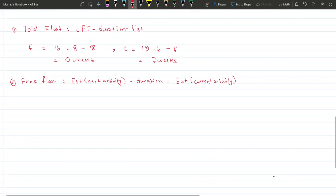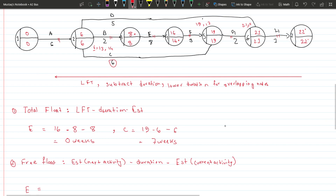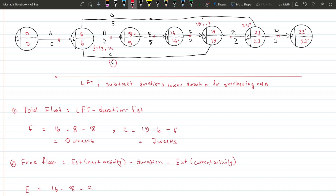For free float, let's calculate it for activity E. The EST for E is eight, the duration is eight, and the EST for the next activity F is sixteen. So: sixteen minus eight minus eight equals zero. Free float tells us whether delaying an activity will delay the next activity specifically, whereas total float is about the whole project.